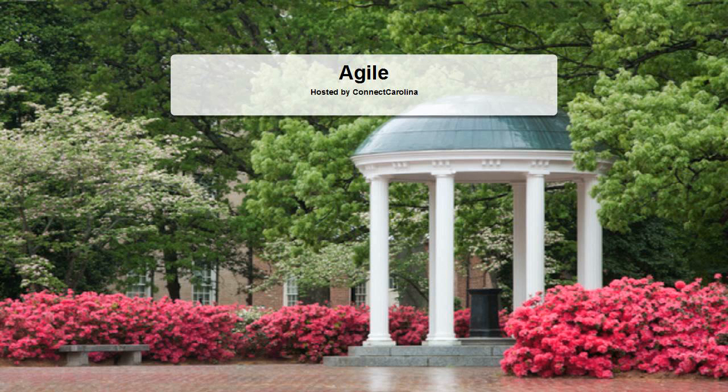And here's just a picture of that breakdown, right? So you have themes. Themes break down into epics, and then epics break down to stories. Now, I talked about the work queue, work that's teed up. Primarily stories should be going into that bucket.